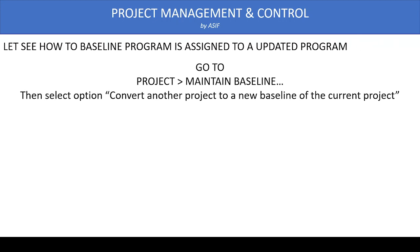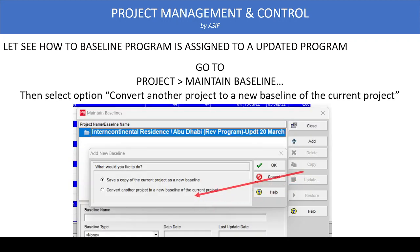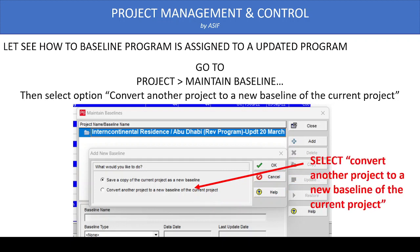In Primavera, assigning the baseline is very simple. We open the updated program and go to the Project option, where there is a 'Maintain Baseline' option. When we click Maintain Baseline, two options appear: 'Save a copy of the current project' and 'Convert another project.' The 'Save a copy' option is used sometimes to save your original work — for example, if you are going to experiment or do a what-if analysis, you can make a copy of the program stored inside as a baseline.